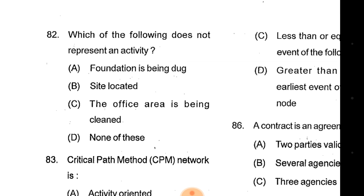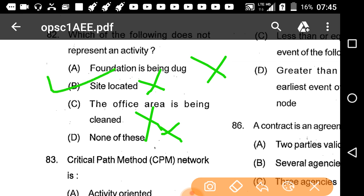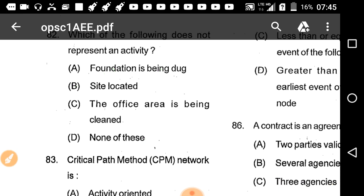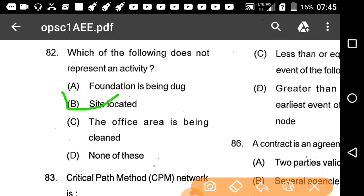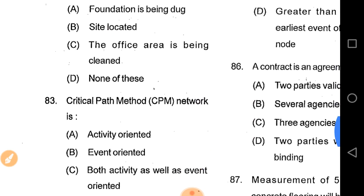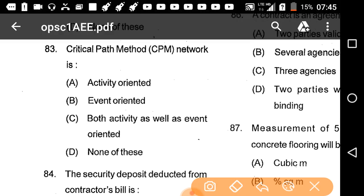Question 82: Which of the following does not represent an activity? Foundation being dug, site located, office area of building. Correct answer is option B — site located. The critical path method is activity-oriented.